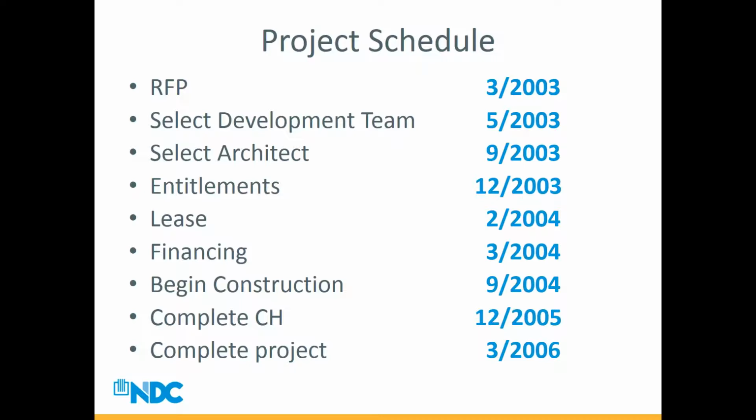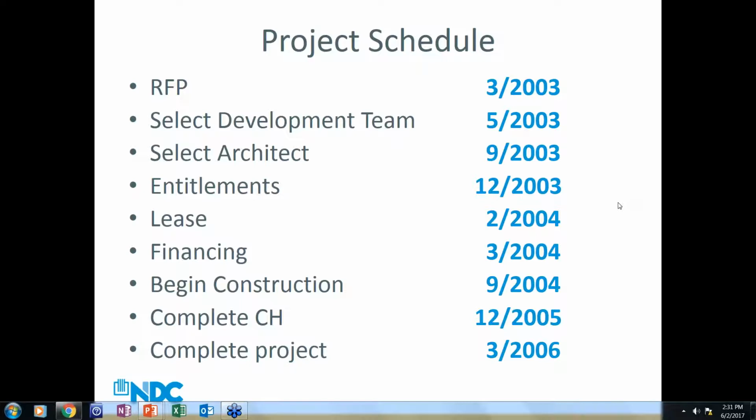The lease that Jane mentioned earlier that the sponsor participates in was agreed to in February of 2004, and then using that American Model mechanism, financing was provided for. The city commits to a long-term general debt type lease through these relationships, and that enables us to get the project underway. So I would say that from the selection of the architect, which is kind of when you really begin to activate the team, to working through the legal relationships and documenting those in the lease and then conducting the financing, we were able to move in to City Hall just a few short years after that.